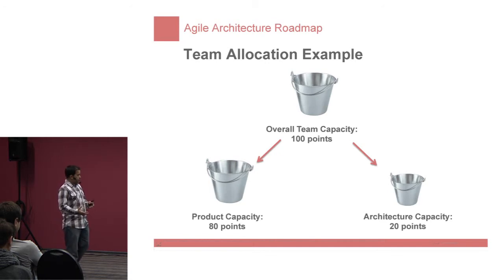We do 20 points of architecture work, so my list flows much more slowly than the list from the product folks. But at the same time, I have the power to prioritize the things that are most important to me without having to justify to product what to do.